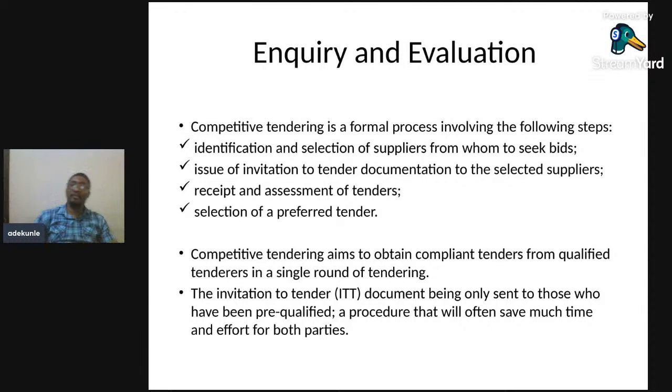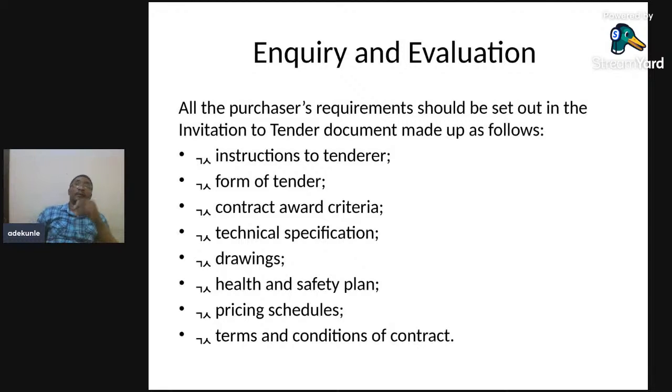Then, of course, during the tender of bids, one of the things done according to the Public Procurement Act is that you use what we call MEAT, the most economically advantageous tender. So all potential requirements. Sometimes this step also assists you in setting out the best requirements in inviting suppliers to tender their documents.